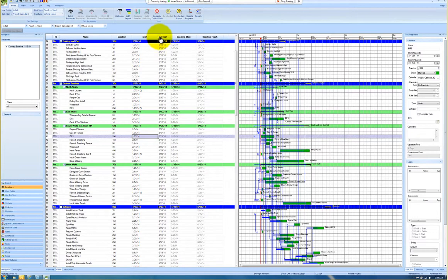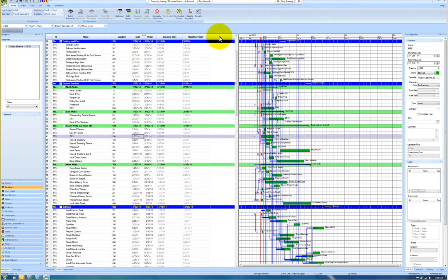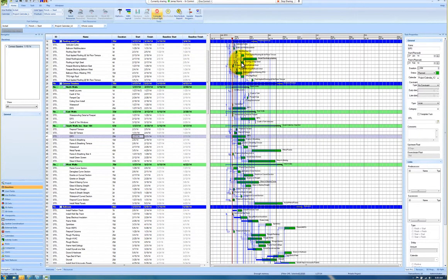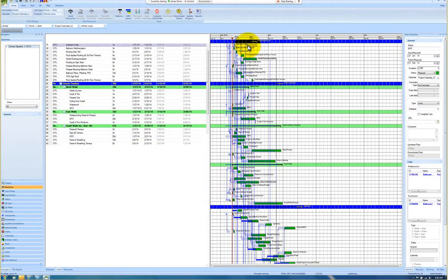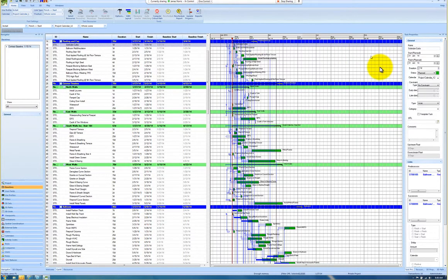It's nice to compare these, because as you're updating, there's a lot that's going on. So as you're updating, if you don't quite remember when it was supposed to start, but you started on time and started on the planned start, which could be the original baseline start, you can just go over to the status under your task properties, and when you click started, you can just choose the date and choose the baseline start date. Because if the first task really did start on 121, not 131, and you know that it's supposed to finish on 121 as well, then you can just go right there.